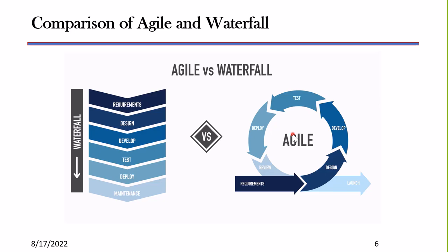When I say that, I'm talking about a term called progressive elaboration. With progressive elaboration, we elaborate on those things that are near to us that we can plan in detail. As we move into more depth in the project and learn more about it, we will add more to the plan itself. That is actually a type of agile.